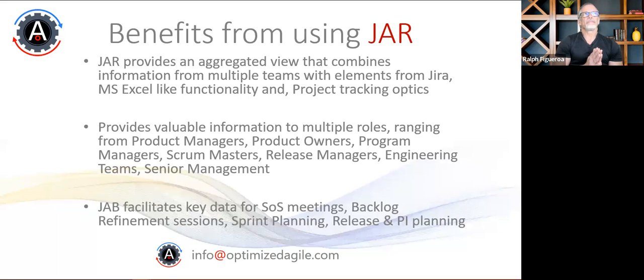It does provide what I describe as an Excel-like functionality where you'll have the Jira fields presented in the tool in rows and columns, and you can edit those directly within Jira Advanced Roadmap. So you don't have to do dual entry. You can even sort some of those fields. For example, if you're doing a refinement session and you want to sort, just attack first the top high priority stories or issues. You could do that within JAR very effectively.